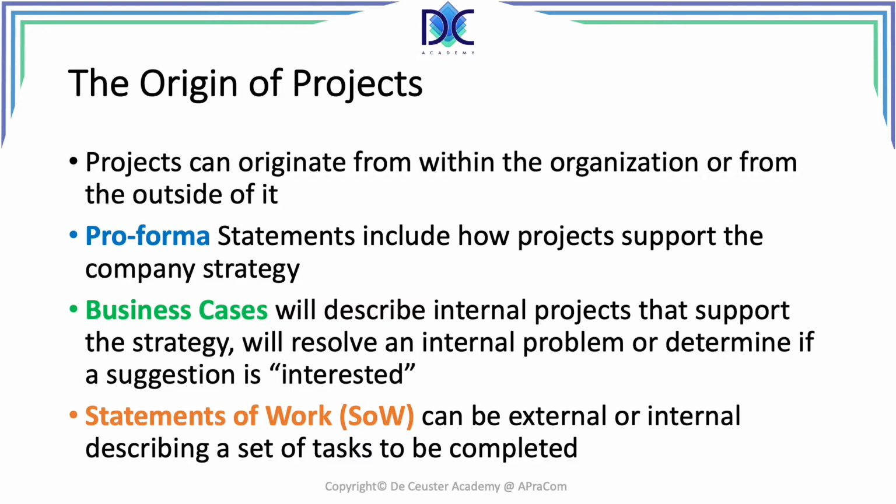support that strategy. Another interesting element for which a business case can be used are suggestions made by the employees or staff of the company. Based on the different parameters of the suggestions, the improvements or the creation of new products, the business case can be used to evaluate a project and select the best ones. In some cases, a feasibility study can be at the basis of a project. The last possibility is a statement of work. This document is typically generated for a client, internal or external, and describes a series of activities that have to be completed in order to honor the agreement.